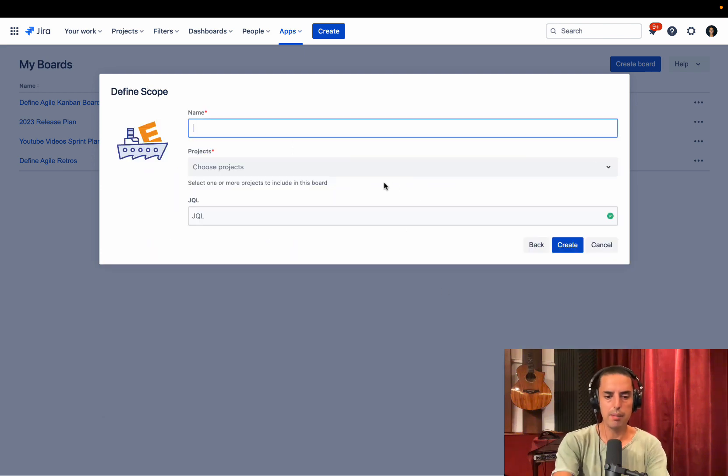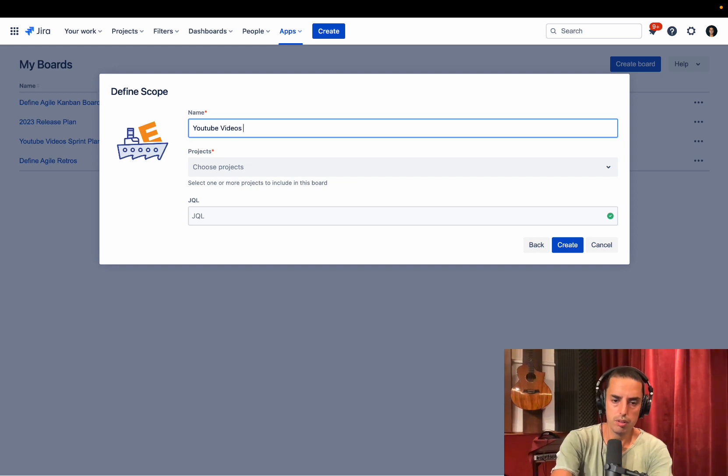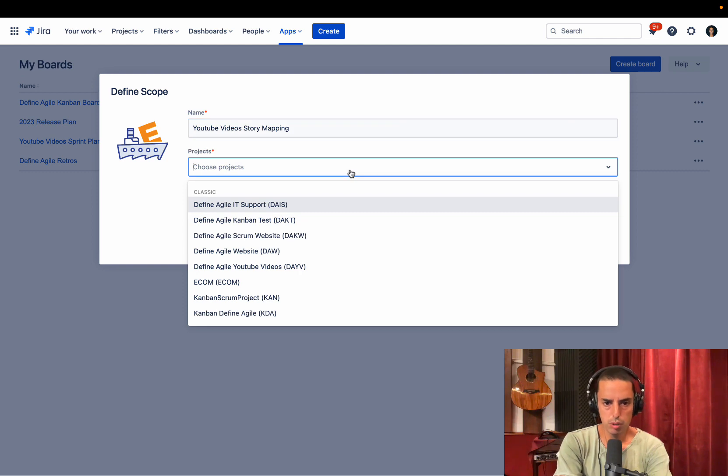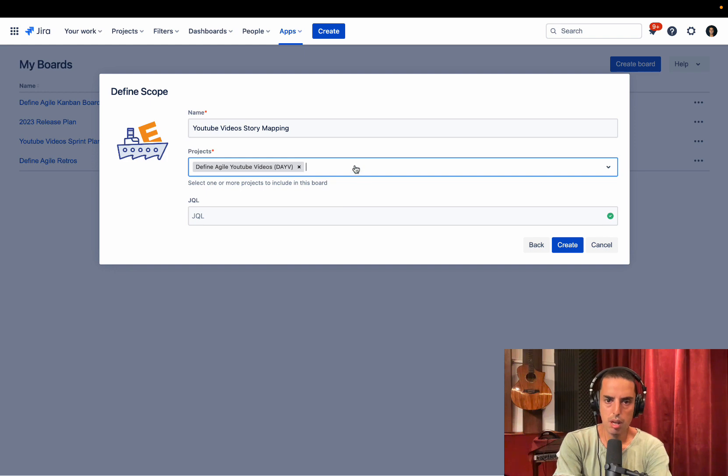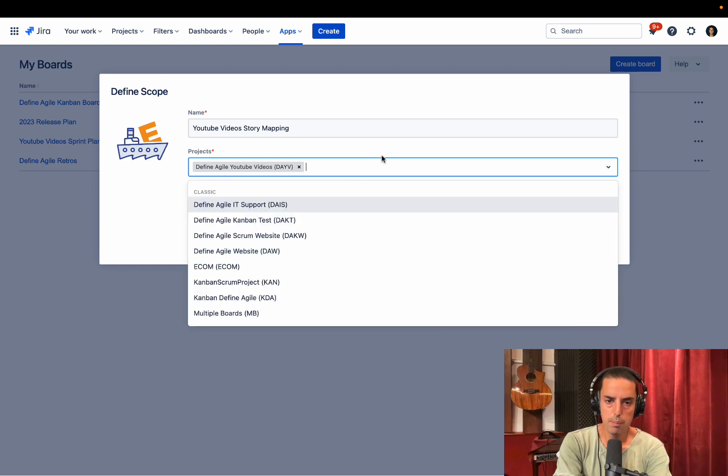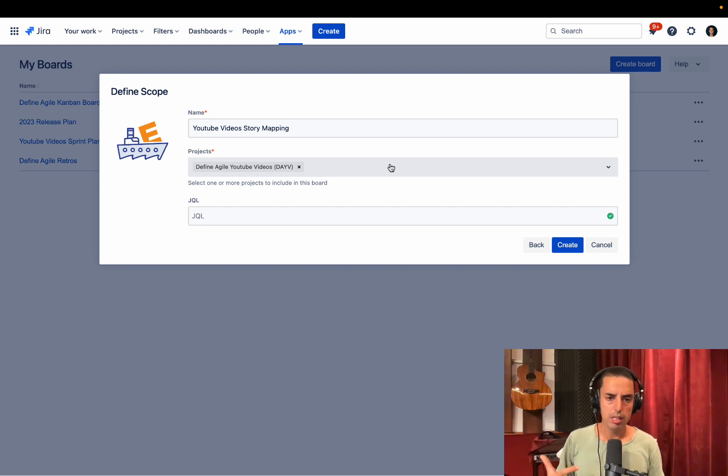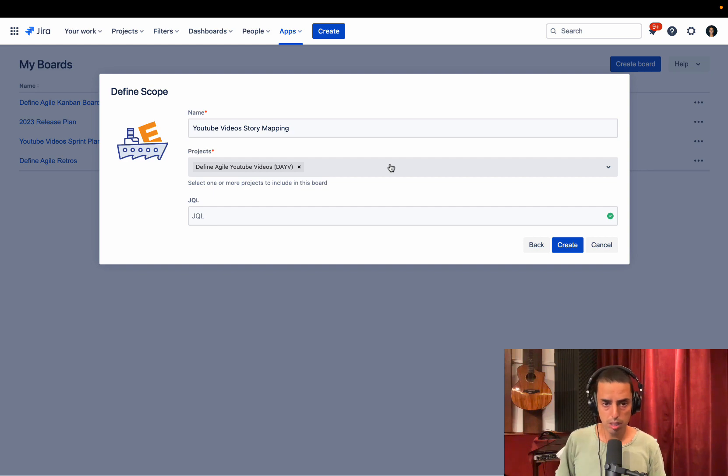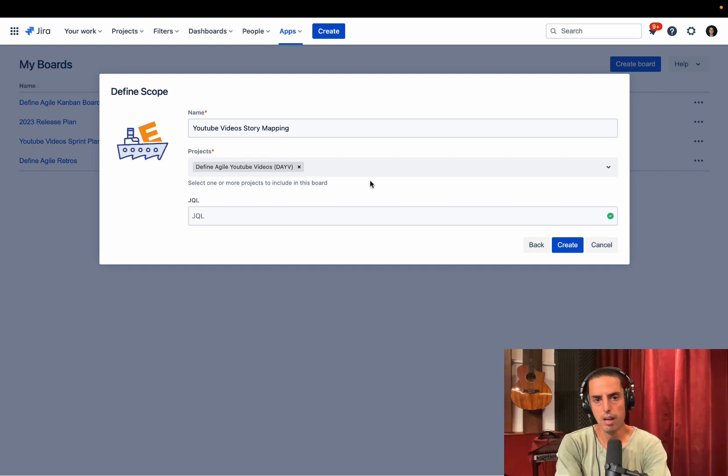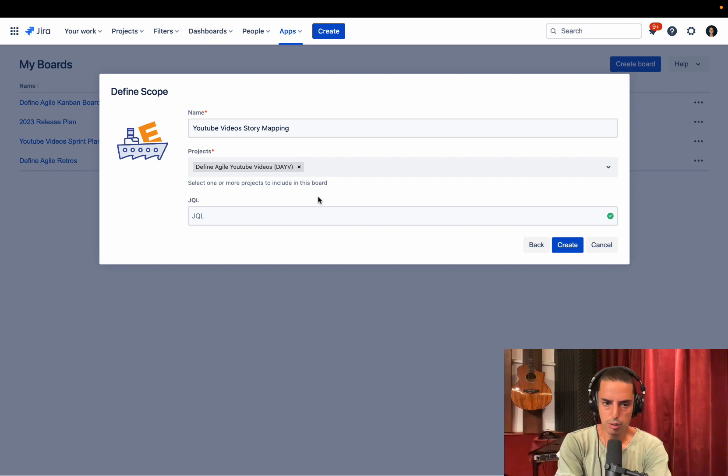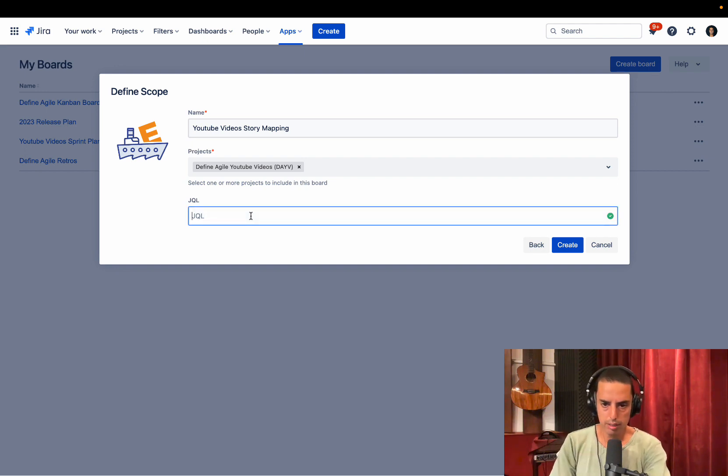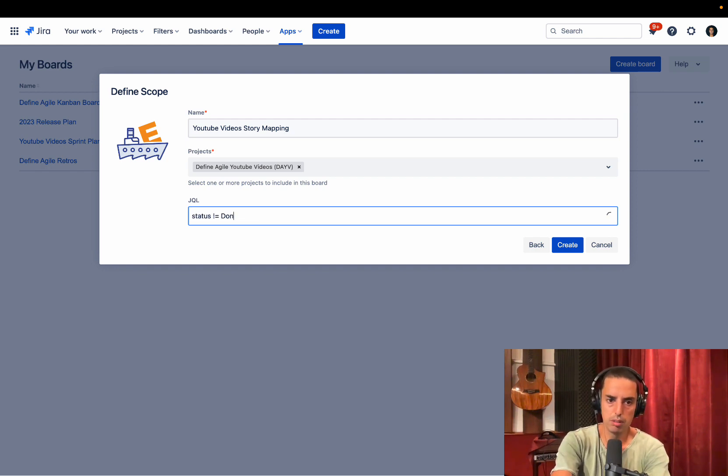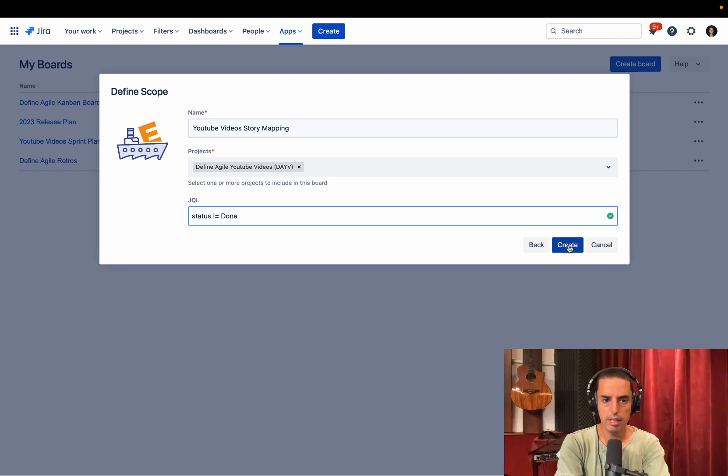We will call it a story mapping board. They already have it predefined for you. So click story mapping, click next. Then you can name it. We'll say YouTube videos story mapping. And then you can choose a project. You can choose multiple ones, but I will choose my project, which is defined agile YouTube videos, which is also a beauty of this. Let's say you have multiple projects and you want to plan releases for multiple projects. You can do that here as well, which is very hard to do in Jira because you have to switch between projects, not very intuitive. So this is a great feature. If you are working, if your products are split, let's say by teams, that might be very useful. Then you can also add JQL filter. Let's say, since we are planning releases, I want to make sure that status is not done. So we don't show any done issues. Now I click create.